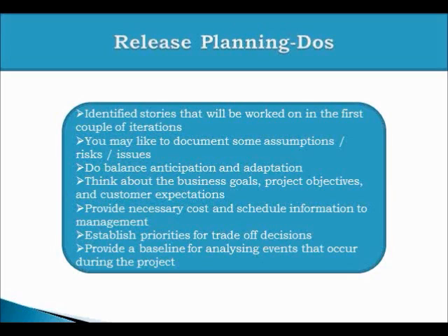You may like to document some assumptions, risks and issues. Some of you raised the query about what happened with the dependency, what happened with the risk. You may like to document the risks, assumptions and issues, and the documentation of these is also dependent on the culture and the environment your company works in. If you are working in a customer or vendor relationship, you may have a stringent process to document assumptions, risks, and issues. If you are working on an in-house product, you may not have that stringent a process to document all this.